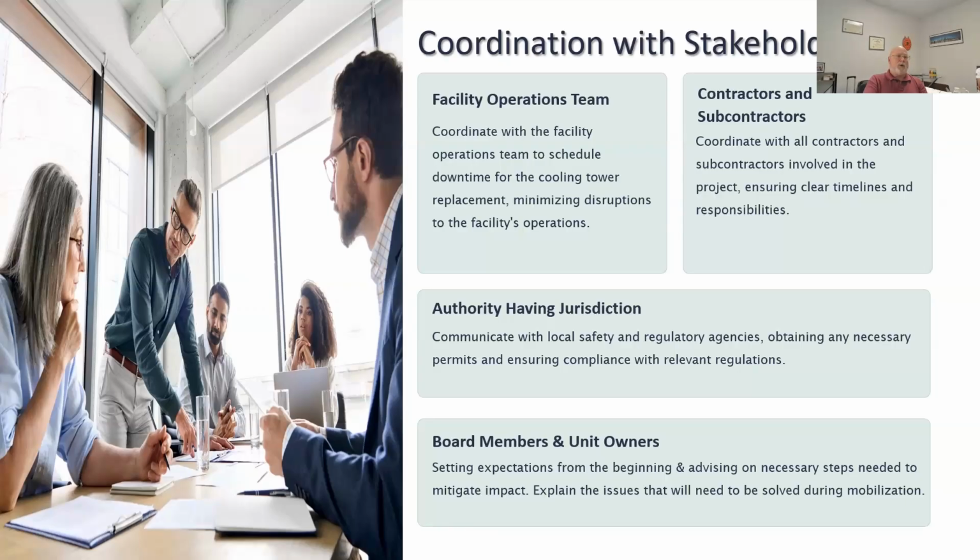While a cooling tower replacement is not going to be nearly as disruptive as a concrete restoration project, it's still going to be disruptive, especially if the association makes the decision that they can live without cooling for 2 days, which some associations decide to do because renting temporary equipment is very expensive and there's a lot that goes into it. Then unit owners have to be able to understand that.